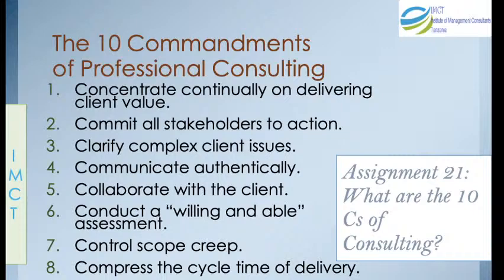Never do any assignment which has no terms of reference. I repeat, never do any assignment which has no terms of reference. Normally, myself, I find a client is not competent to develop terms of reference. So after listening to him carefully, then you understand, you develop a second document, which you call an inception report, your understanding of the assignment. When the client has signed the inception report, that forms a very clear scope of your work.